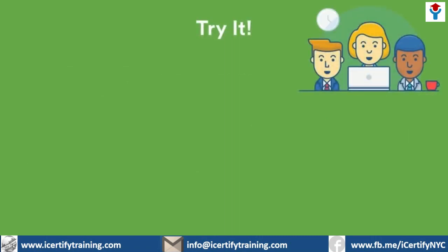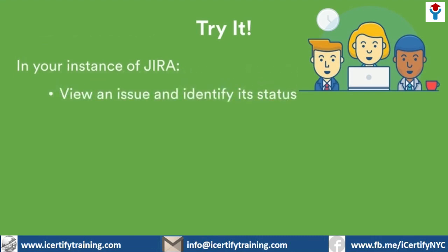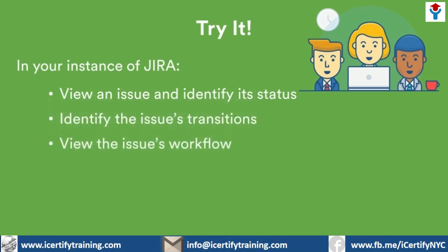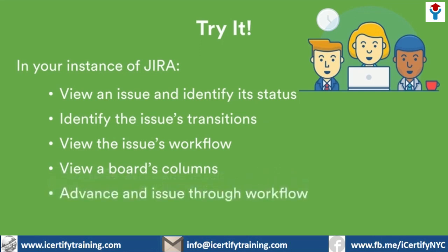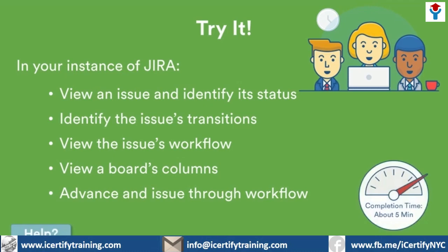Take some time to apply what you've learned in your own project. Open your instance of Jira and open an issue. What's the status of the issue? What workflow transitions are available for the issue? Click the View Workflow link and view the full workflow and mouse over some of the transitions. If you're using a board, what are the columns on the board? These represent your workflow. Optionally, if you have a test issue you can experiment with, advance the issue through its workflow.